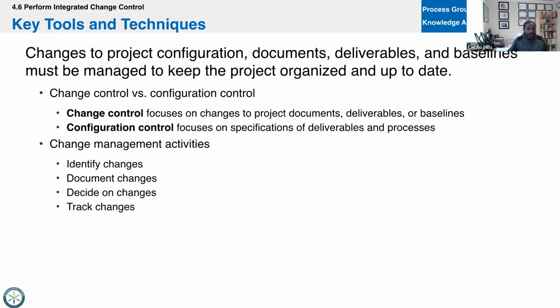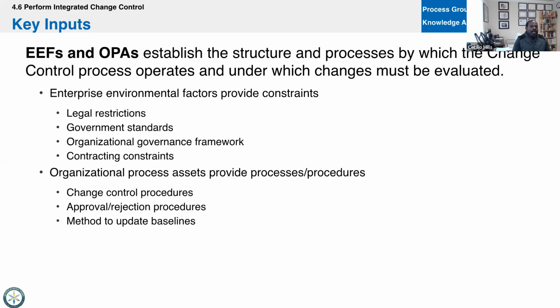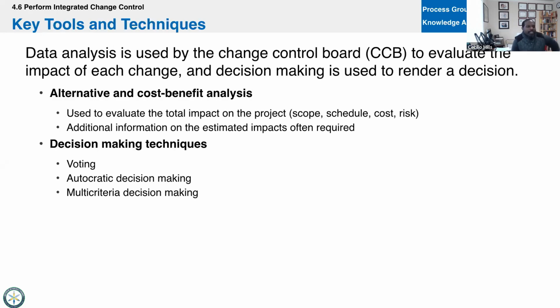When we talk about data analysis, this is the idea that any change that takes place, you need to evaluate the scope, schedule, budget, and you need to provide that information to the CCB so that they can approve that change.